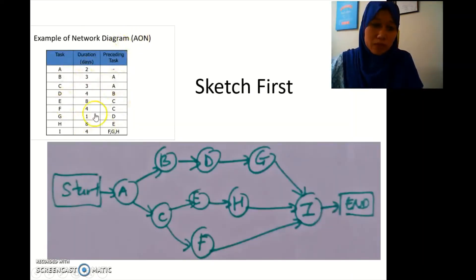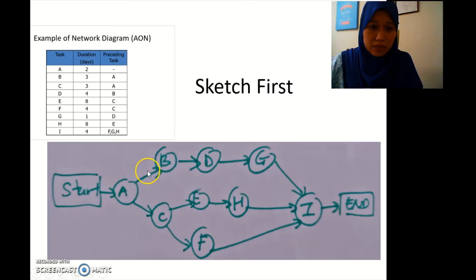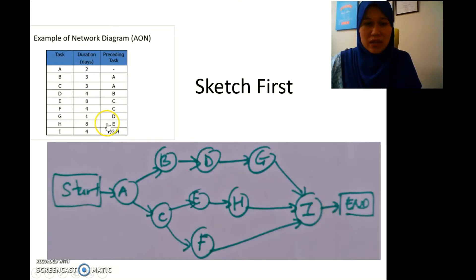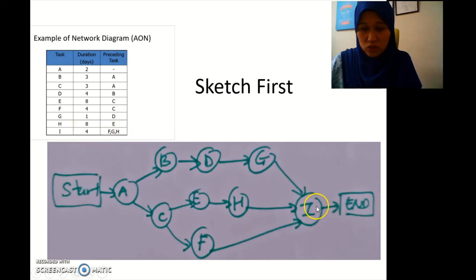From this information we start with the start box, then A, and A goes to B. We find B here, and A also goes to C, then B goes to D, C goes to E, and so on. You have to connect all the tasks using arrows. At the end we have I, which comes from F, G, and H, and then we close it with an end box.